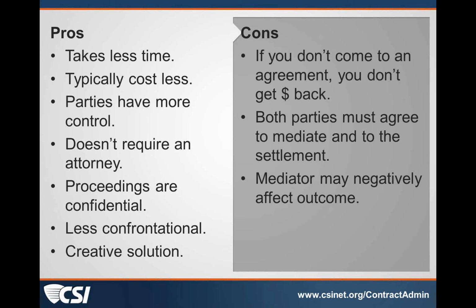I don't think it specifically says that if you don't provide it, you waive the claim, but that's something that can certainly be added as a supplemental general condition. So I think there are contract mechanisms that you can use to address those things.